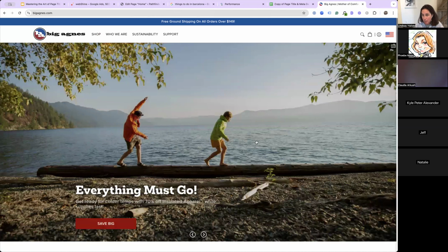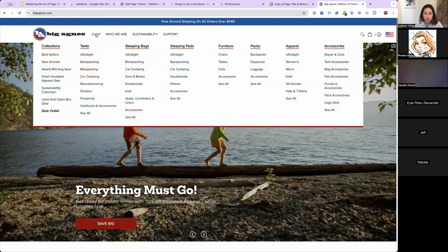So we can do some math around the size and scale of the effort to see if it fits into our budget. If it doesn't, if that's too much for, say, the SEO setup you're doing in conjunction with a new website going live, you might have to get even more strategic about how you break this down. And you can do this by saying, okay, well, then we're going to only go across the top. We're just going to do the high level, like the see all pages. That would be one way to kind of stay wide on the website, essentially hitting all the different product categories, but not going as deep. And then down the road, as part of our monthly SEO service, maybe we'll come back around and we'll customize page titles and meta descriptions for these internal collection pages, for instance.